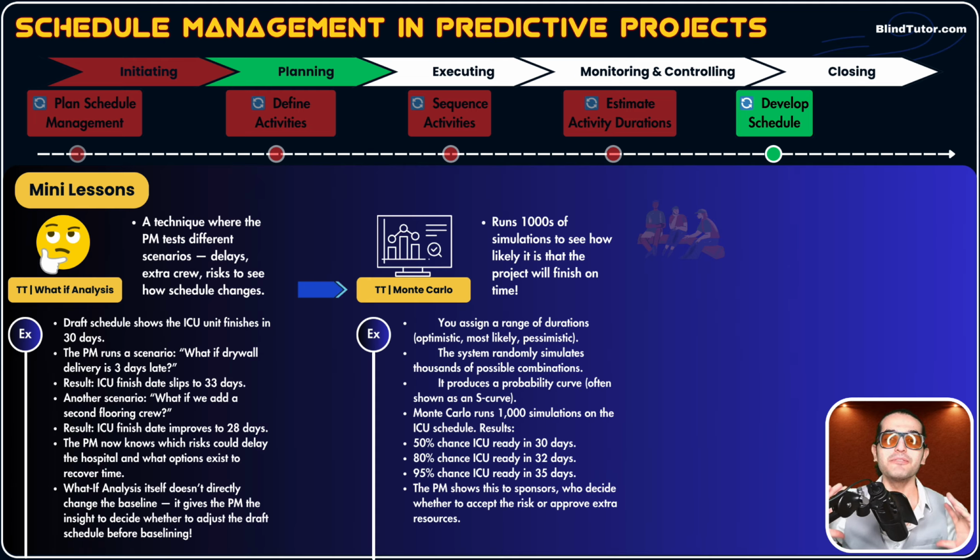You plan everything on those 35 days because we are more certain about 35 days, a 95% chance. That initial 30 days was like a 50% chance. When you consider a scenario with more probability, your planning is more realistic, guys. Monte Carlo simulation helps you have a more realistic planning and a more certain finish date, because it considers different scenarios and runs tens of thousands of simulations.